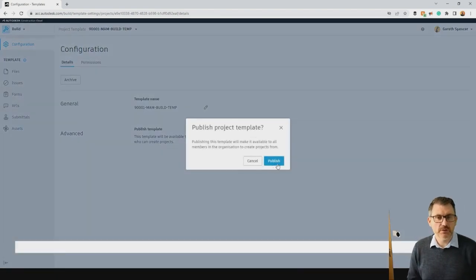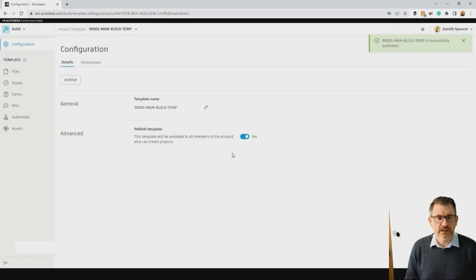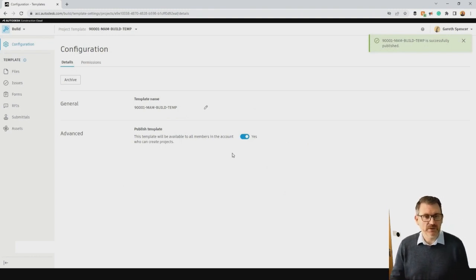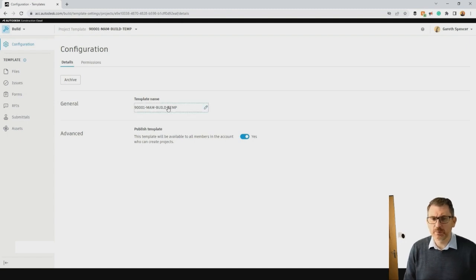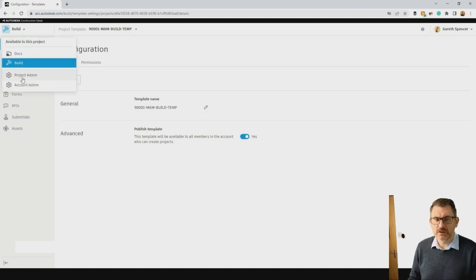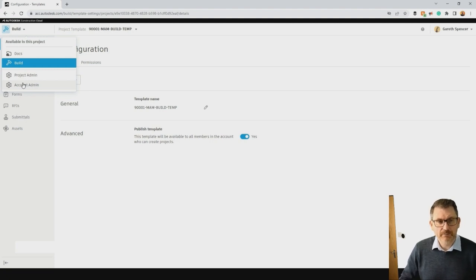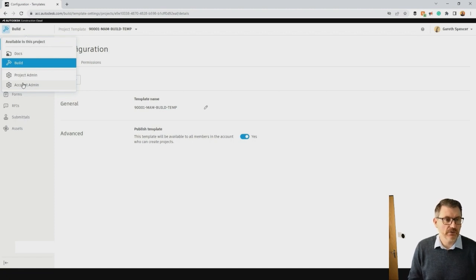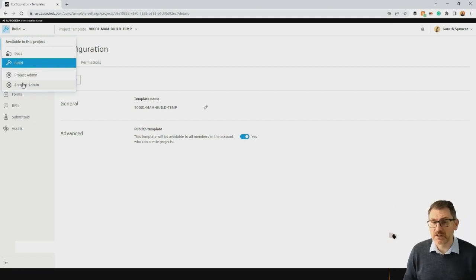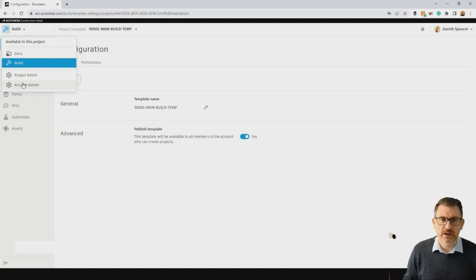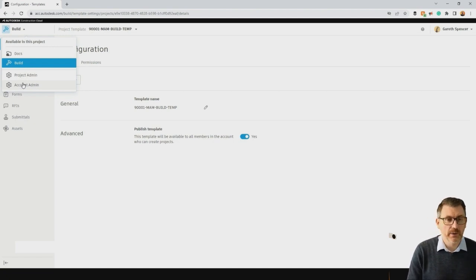We now have a published template access point, which allows us to share templates with other people when ready. You'll see at the top we can select different services for our projects. We can set up things like our folder structure, what forms we may utilise, and what issue lists we need. If we do this in our template it automates that process so we're not spending a lot of time at the beginning of a project setting it up — we just add the relevant information and people, then get going.